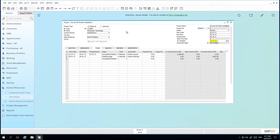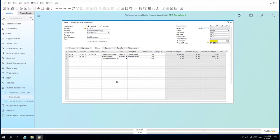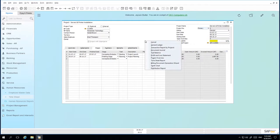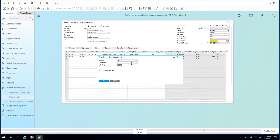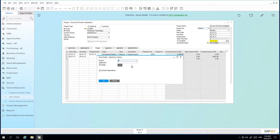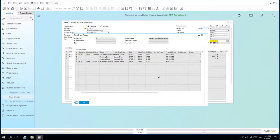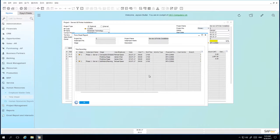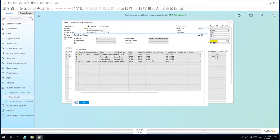Under the project window and under the stages tab, we are now going to view via the context menu the timesheet report. So we simply right click and open up timesheet report. We have got the ability to select a specific sub project or stage that we would like to review the timesheets that have been assigned against these sub projects or stages. From here, we can see the link between the project stages and also the recorded times billable by the relevant employees.